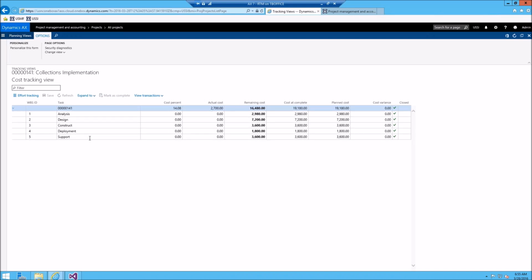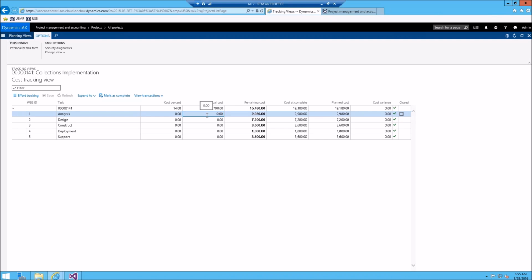And notice I screwed that up because all the costs is up here, and the actuals, it's shown at the project level because I forgot to post to a specific activity. And if you don't post to an activity, that's what's happening. It's going to go to that root node. So if you want to show up here, you have to actually stamp an activity on there.